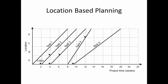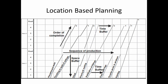The modern tools represent this in a much more structured way and can have far more detailed representations. Location based planning is not just a series of lines but can have a lot of planning parameters associated with it. For example, you have tower 1, tower 2, floor 1, floor 2, floor 3, roof — what we call a location breakdown structure or LBS. When doing location based planning, you integrate a location breakdown structure as well as a work breakdown structure, because work gets done at a location with a specific activity. Both integrations take place in LBMS.